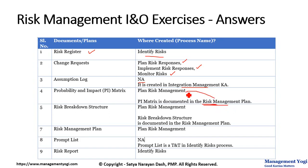The Risk Breakdown Structure (RBS) is also not a separate document — it is documented as part of the risk management plan and is created in the Plan Risk Management process. As covered in the lesson on risk management planning, each and every element of the risk management plan will be important for your RMP exam.